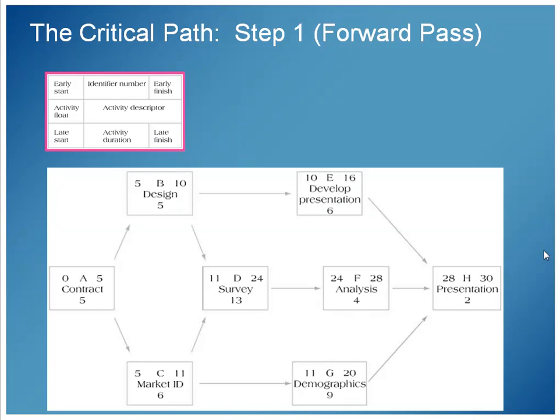We can make a forward pass of coming up and adding the duration to each one of those. And again, just notice the duration. It's real easy. The start time plus duration gives us the end time. Start time plus duration gives us end time. So I know there's a lot. The first time you look at that, it's pretty complicated and busy, but it's not such a big deal.